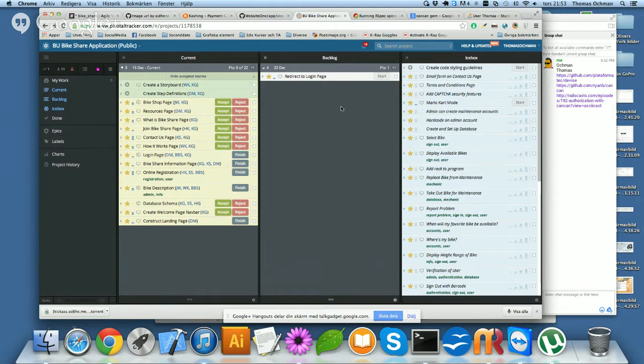Like for instance, in website 1, we're using GitHub and Google Plus to log people in, right? It's just one-click login. It's a good service, I use it personally. I never have to type in my username into website 1. So this is something that could lead to another story, because implementing this sort of login system is a story in itself, and since it's an external service, automatically a 3-pointer basically.